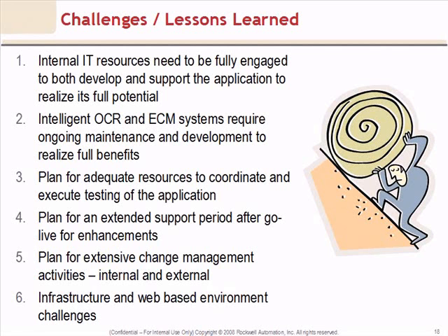One of the challenges that we faced also, in addition to the IT side, was having the adequate business resources to both coordinate as well as execute the testing of the application. We did not add resources to do this, but tried to leverage the existing resources we had. But again, it's a challenging process, and because of the tight integration with the SAP application and the integration between the OCR tool and the enterprise content tool, it took a fair amount of testing to get through the process.